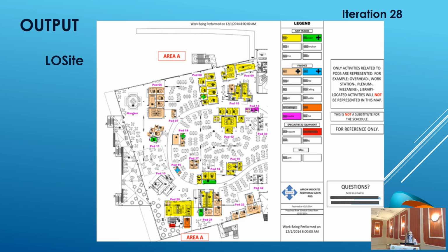You can see on the left-hand side of the screen one area that is colored up. And some areas include some symbols, and it meant in these areas that the trade has to share the space with another trade. You could ask, but why would you show this? Basically, we wanted this tool to also help the general contractor troubleshoot their schedule, and we were hoping that the general contractor, when noticing that 2 trades were sharing the same space, would modify the schedule accordingly.